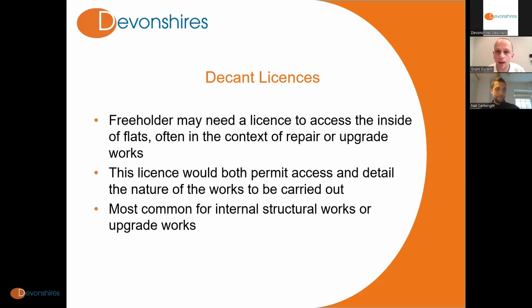Sure. Last one for me is decant licenses. So just to set the scene here, this is if you own the freehold of a building, likely a block of flats, and you need to do work to the block of flats, which means that you're going to need vacant possession of either all or part of people's flats. But you have leaseholders in there who own their flats. You would need what's known as a decant license, and this is in the context of essentially emptying the building and rehousing either temporarily or permanently the occupants.